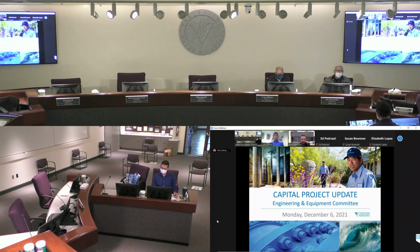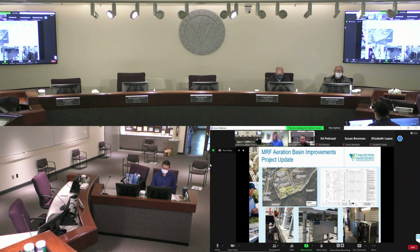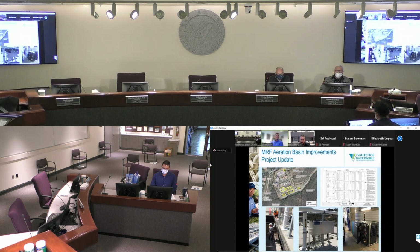Hi, Director Hernandez, Director Elitharp. We'd like to begin with the project over at our Meadowlark treatment plant. Over at Meadowlark, we've got three projects that were slated for construction this year. We have the headworks, odor scrubber number one, and the aeration basin. Two out of the three projects were completed, the headworks and the odor scrubber number one. Unfortunately, due to supply chain issues this year, the aeration basin was delayed.